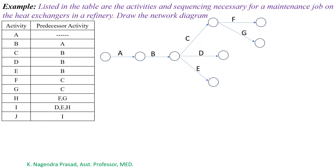Next, observe activity H. For activity H, F and G are the predecessor activities, which means after completion of F and G, activity H will start. So draw activity H. Here, observe that activities F and G are having common successor and predecessor activities for activity C and H. So draw a dummy activity at F.